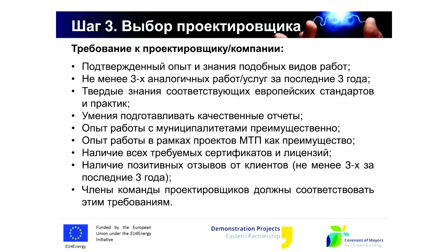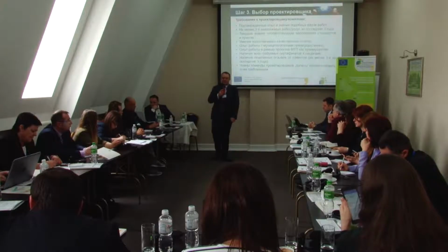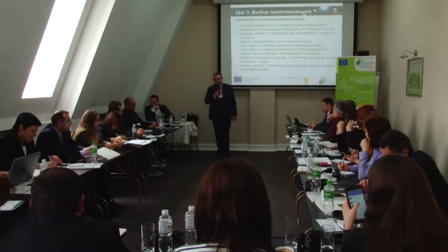You have seen already step number 3. The only thing is that in 100% of cases the designer must have the corresponding licenses and certificates which are envisaged by the national legislation and have the necessary experience of real implementation of similar projects, with confirmation of this experience. Confirmation may be in recommendations, in letters of reference given by previous customers, and so forth.